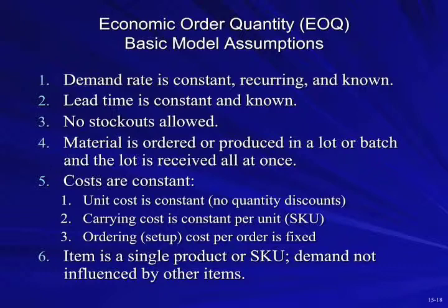There are many assumptions that go into an EOQ. You look at the demand and try to define that. You have to look at lead time and get your arms around the lead time. You basically assume there are no stockouts in your thinking, and you have to order the material in quantities that optimize both your costs and your schedule. And you look at when costs are fixed costs and when they're variable costs to determine the cost of your individual production unit.